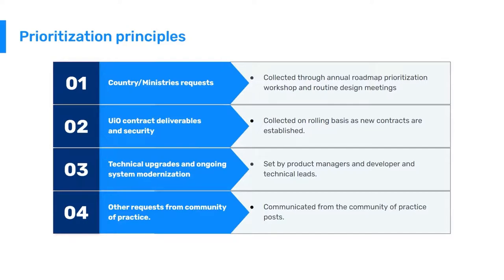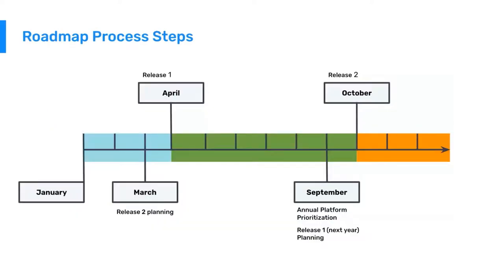This is an illustrative timeline of the roadmap process steps. Starting at the beginning of the year, we have two annual releases of the platform — in April and October. We begin planning for the following release the month before the first release is completed.